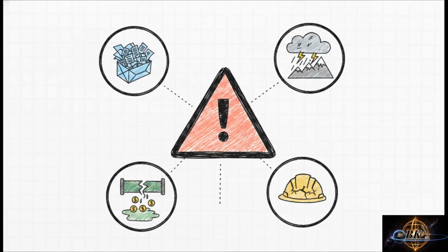First up, we've got to face the music with risk assessment. You have to look at the company's current backlog. Are we desperate for work and willing to bid cheap? Or are we already stretched way too thin and need a serious premium to even consider taking this on? We also have to evaluate hidden environmental risks, the reputation of the owner, our own cash flow, and supplier reliability, because every single risk you identify here directly dictates how you protect yourself in the next step.